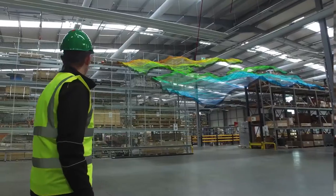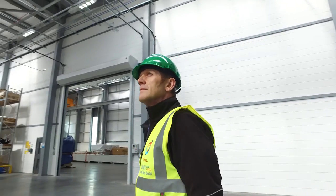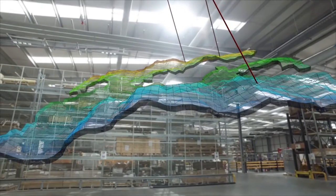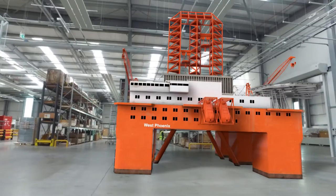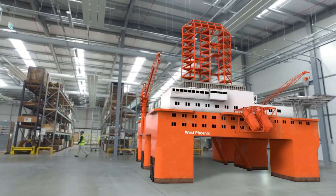On Glenlivet, two deviated wells were drilled in 2015 and suspended until completion in 2018. Working again with the West Phoenix builds on 2 years of development experience. Learning from Lagan-Tormor and reusing equipment designs and procedures will lower project and field operating costs and reduce environmental impact.